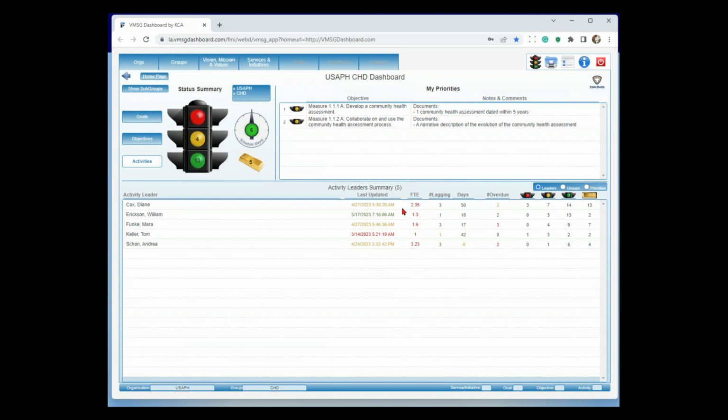This is another roll-up of those FTE numbers. Again, if you should choose to use that, it gives you the ability to see how loaded is each person in here. In an ideal world, you want everybody to be at a 1 or below. When you can start getting up into the 1.3, 1.6, you're overloading people pretty well.